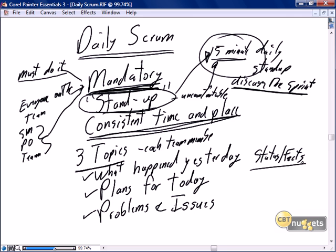As soon as we get into a discussion — team member one says what happened yesterday, team member two says 'can you give me more detail?' — do the timeout sign and say that's not a daily scrum topic. If they want to discuss user story 15, commit to meeting after the daily scrum. The daily scrum needs to be focused on status and facts. What happened yesterday? No chit chat.